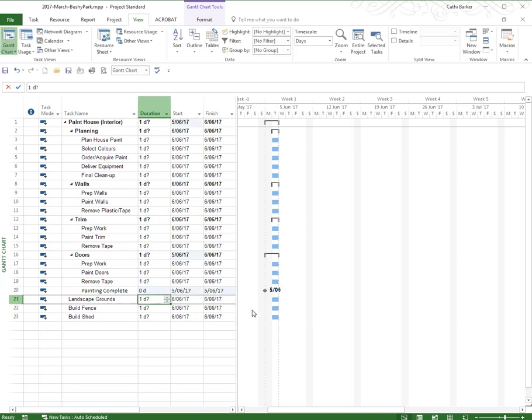As soon as you put 0 duration, you've created a milestone. And so it's immediately shown as a diamond and gives me a date, which is the 5th of the 6th. If I then went to here and said project complete, 0D, again a milestone appears as a zero duration, and it appears as a diamond with a date. And so that's what milestones are.